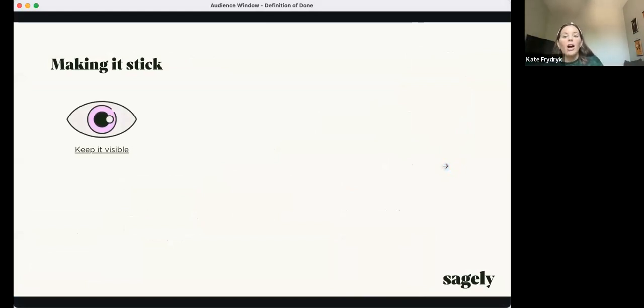You want to make it hard to miss and forget. Automate it. So much of this definition of done can and should be automated, even just completing the checklist. The pipeline can tell us that the tests are passing, if security requirements are met, code coverage, etc. So where we can automate, we should definitely look to do that.